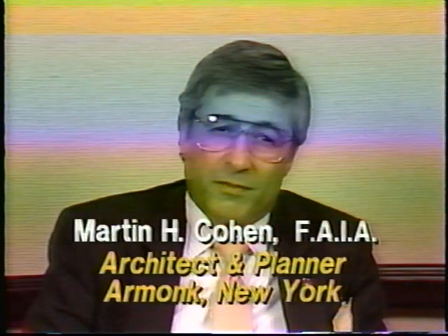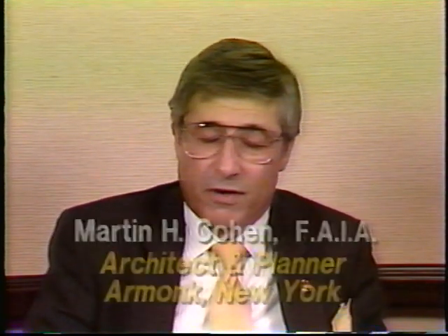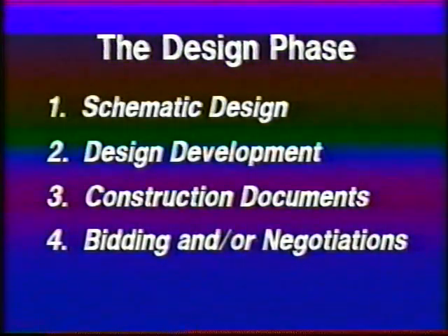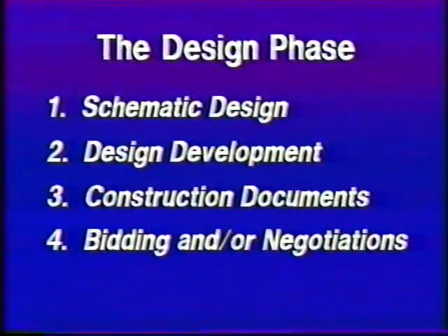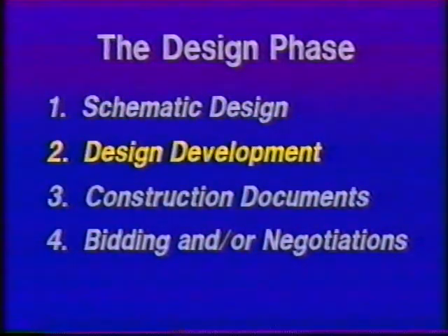The design phase is that part of the project that runs all the way from the definition of requirements and programming to the point where you're ready to proceed with construction, knowing precisely what you're going to build, where, how much it's going to cost, and who's going to do the work. The phases that comprise the design activity usually include schematic design, design development, construction documents, and bidding and negotiation.